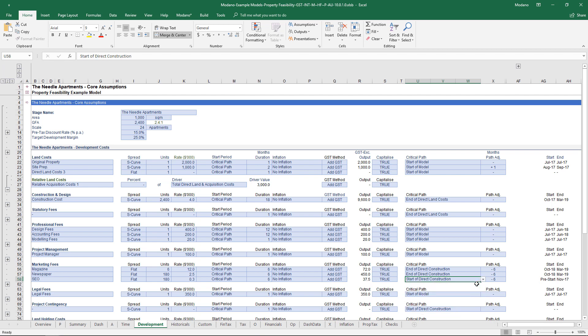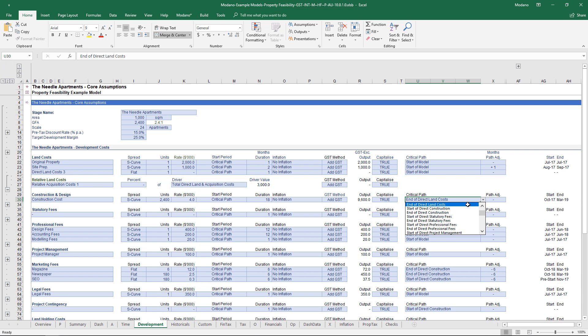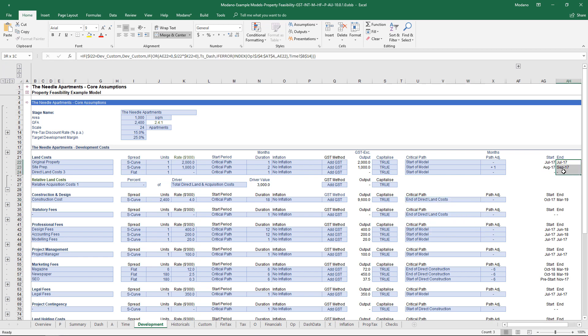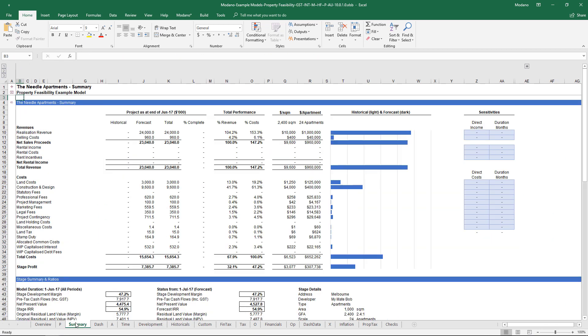In this particular example, my land costs commence at the start of the model. However, my construction and design is set to critical path, and that critical path is set to the end of the direct land costs. So whenever my land costs are complete, my construction and design will then start.